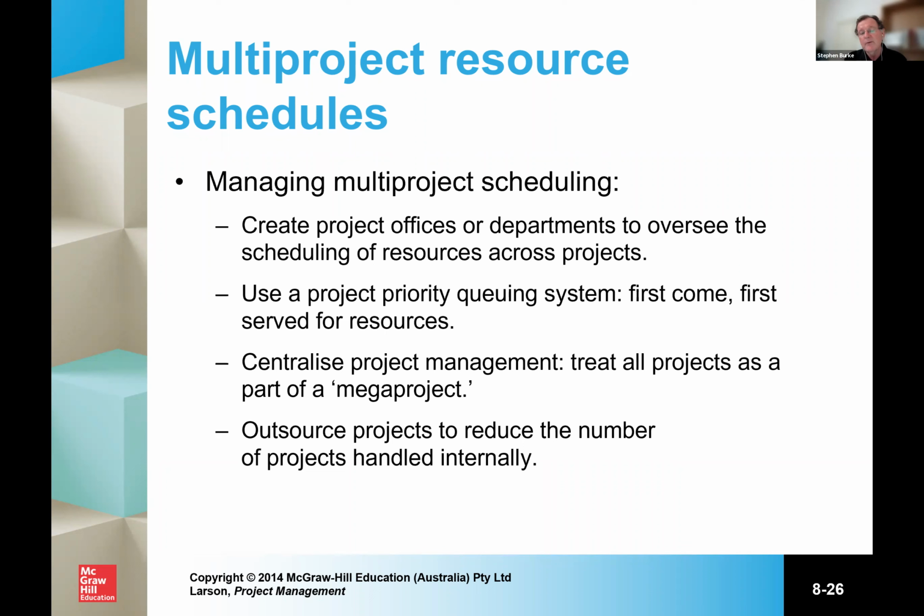Or there may be some other way of allocating resources, indicating, for example, that allocating extra resources to project A may mean that it finishes in such a way that project B can't start. Project B can't start, say, for 10 days after project A finishes. The point I'm making is that moving resources around multiple projects will start to change how the projects then interrelate. I probably wasn't all that clear in my explanation there, but I'm sure you get what I mean.